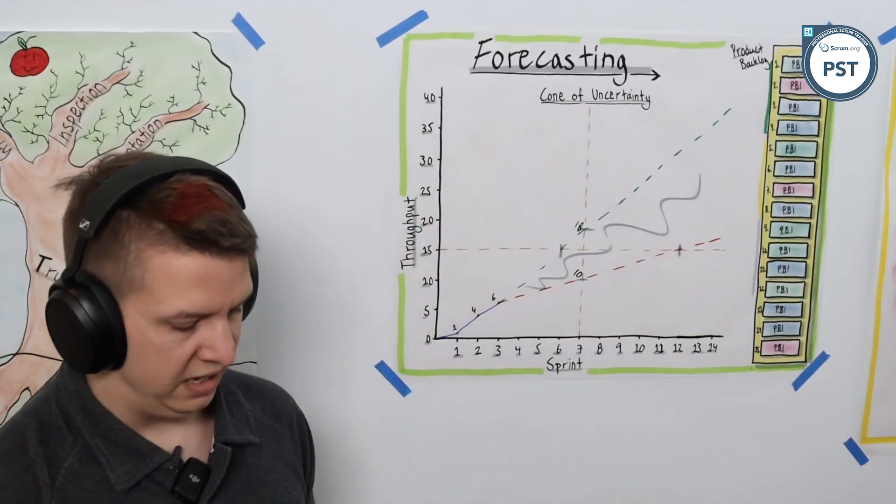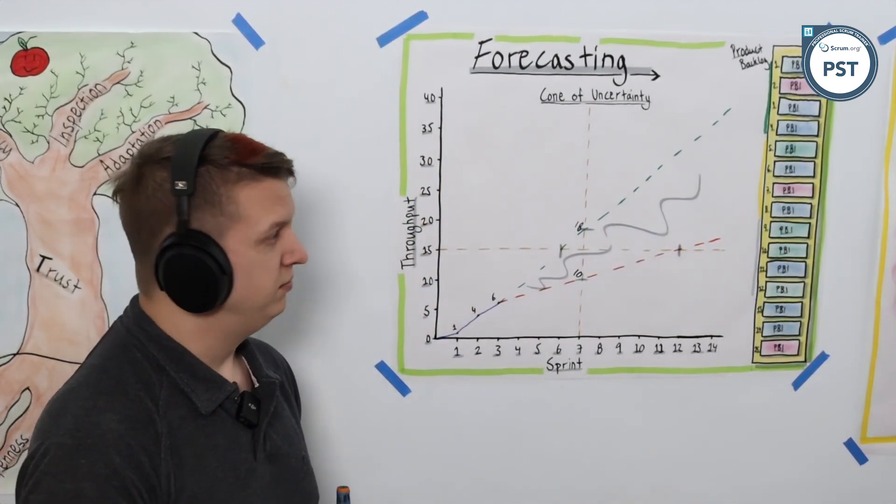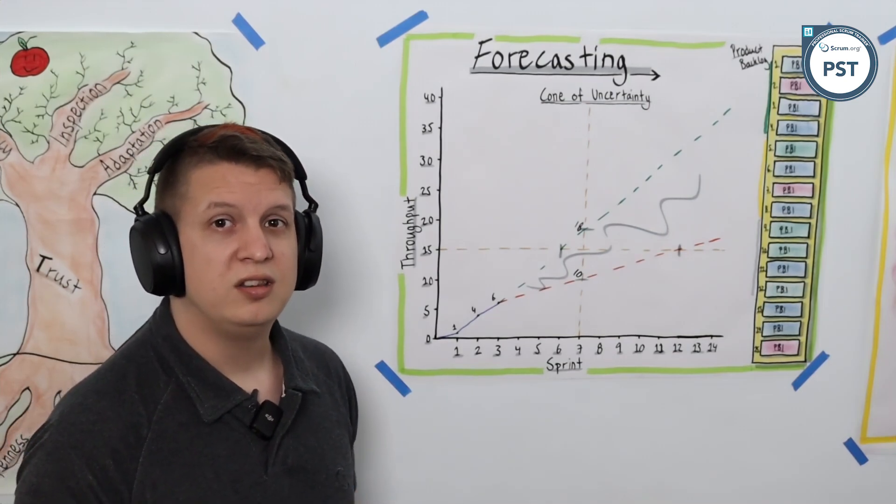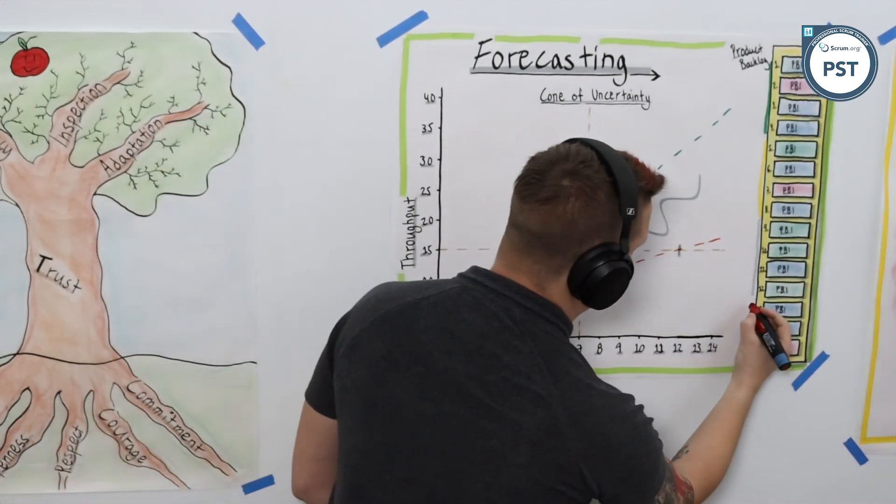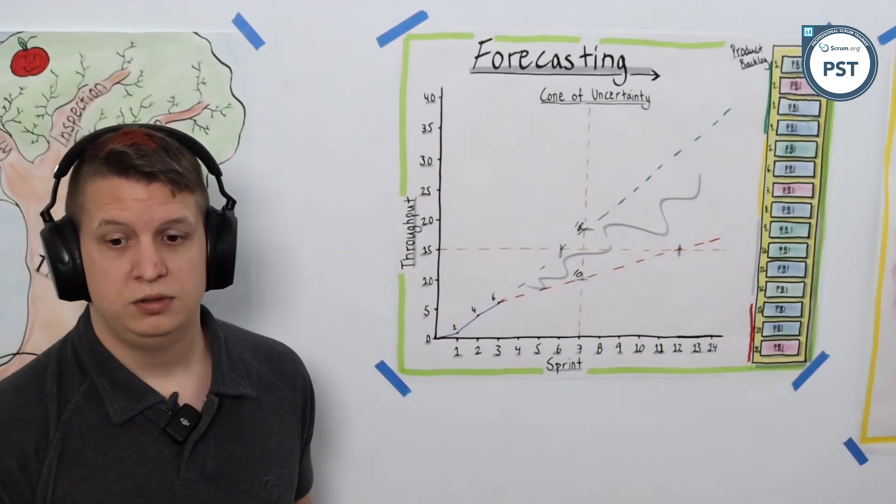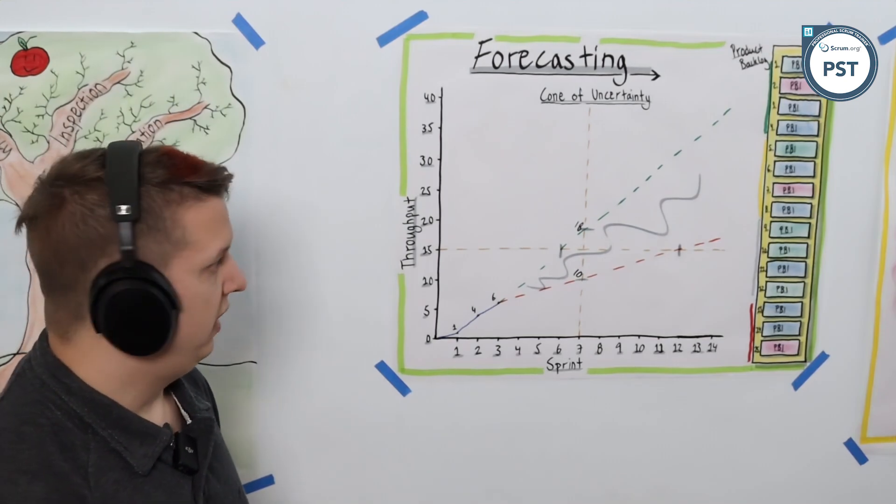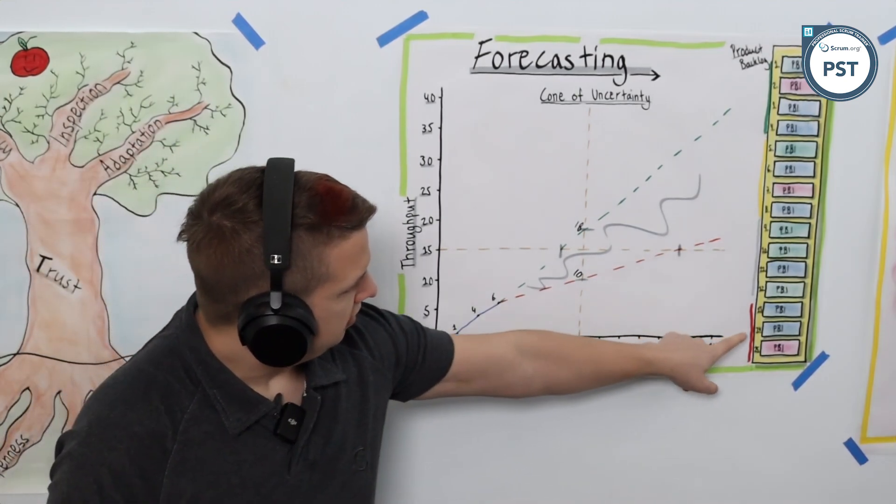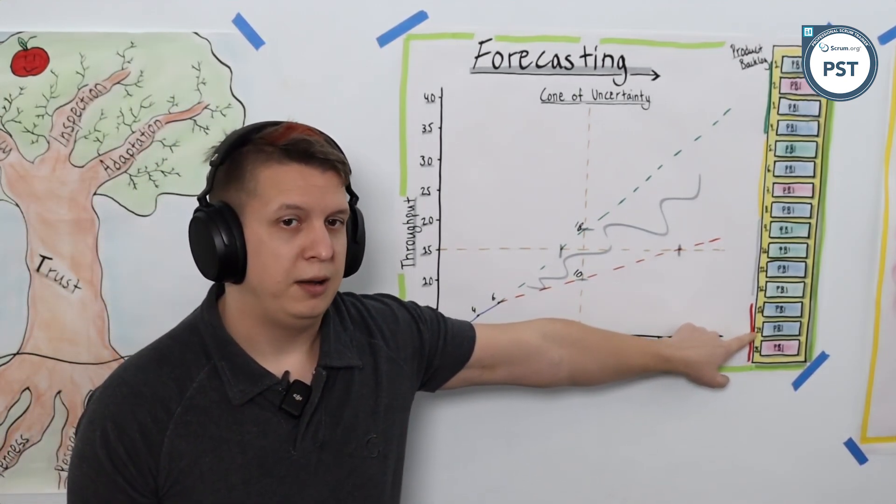Then we get into the area where we really want to be careful, because even with our best results so far, this has never happened. That's these three down here, which means we really don't want to be promising those three at all.